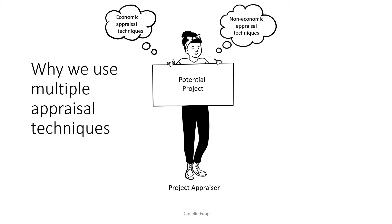Appraisal techniques in this course will be divided into those which are economic-based — for example, financial appraisal — and those which are non-economic-based and results-orientated. As a general rule, the costs and returns will be projected for the life of the project. The net present value (NPV) will illustrate the percentage of recovery of the capital cost within the project period. The internal rate of return (IRR) will demonstrate the percentage returns of the individual project over a fixed period of time. Other factors such as annual return will be calculated once a cost estimate for construction has been made.